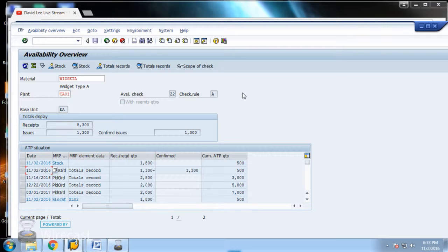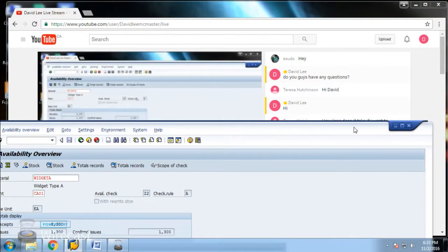For example, if you have drop ship, if you have subcontracting, all of that will increase the time it will take to blueprint and configure the software. And of course, it also depends on the number of integrated systems that you have. For example, if you have a manufacturing execution system, or any software that has to integrate with this particular system, then all of that will vary the time and the effort required as well.